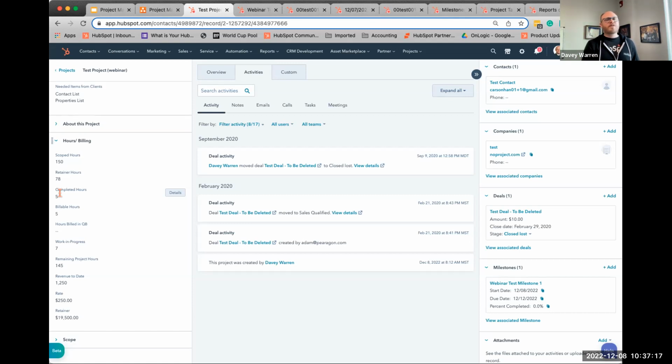So I want to know what those are, but I also want to know that, did I just do 120 hours for the client when I set aside only 80 hours to do the work? Did I just blow through 40 hours? This has allowed us, earlier last year, we were blowing so many hours with clients, and this allowed us to see where and how as we dug a little bit deeper.